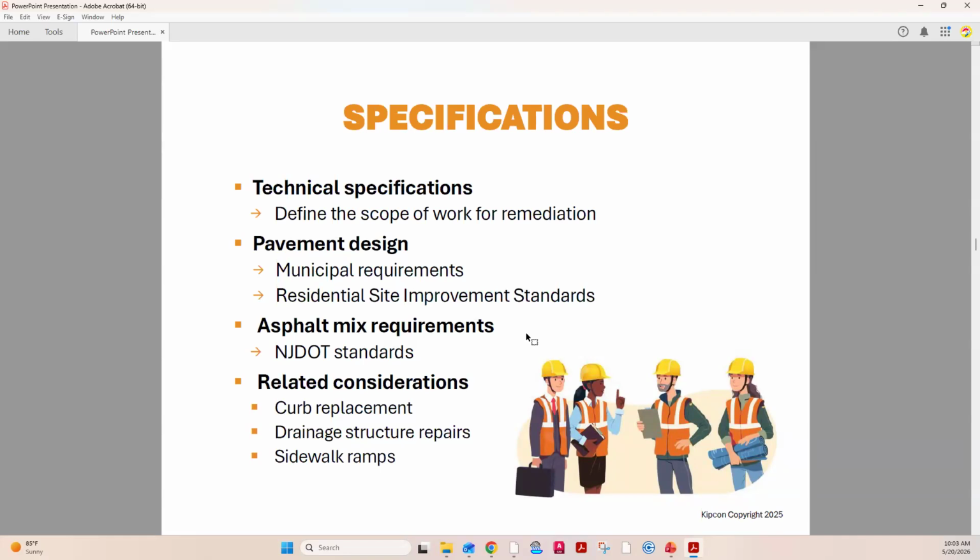They check the pipe connections. Sometimes those repairs are required before the pavement project can proceed. Also, concrete sidewalk ramps where they come down. This is where you're walking down the sidewalk and where it comes down, that last section or sections that come down to meet the pavement.